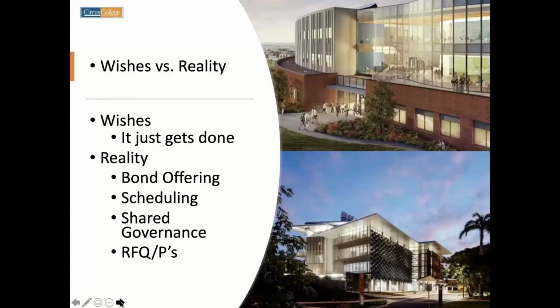So the first committee that all of this information has to go through is the Physical Resources Committee. I am one of the primary people that is on that committee. Once stuff gets approved in the Physical Resources Committee, which is primarily on physical plant side, so all of the building systems, that type of deal, the finance side takes over. That committee is the Financial Resources Committee. They would approve any of the financial offerings. Once that is said and done, then it goes over to steering.